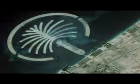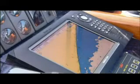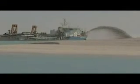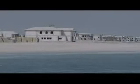The island quickly emerged out of the waters of the Arabian Gulf. Digital GPS technology was used throughout the process to ensure the correct shape and volume of the island. Essential to the reclamation process is for the sand to settle, to create a landmass that provides a strong foundation to build on. There is a misconception that the Palm Jumeirah is sinking.